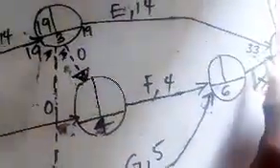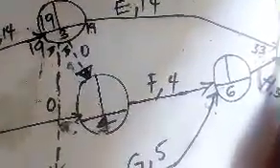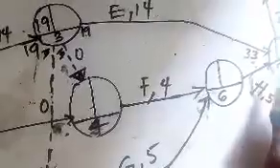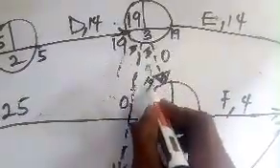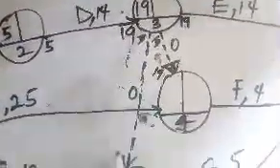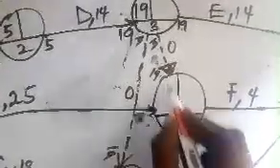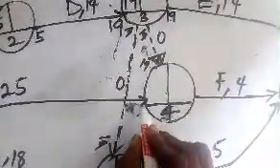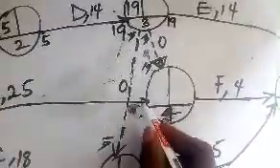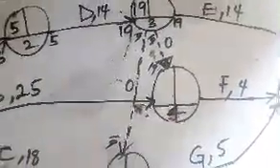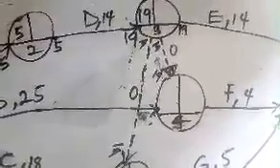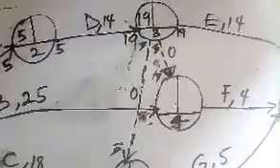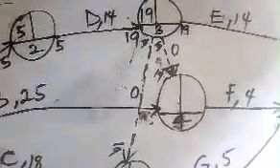So I have this as 33 beneath here. 33 can't enter here yet. Why? Because I have another activity coming here. So I need to consider the greatest value. So I come back here. 19 plus 0, 19, beneath this arrow. 19 plus 0, 19, to this arrow. So 19 can enter here because I have another activity coming in here. This is applicable to any daily life activities. Wherever we are being taught engineering maths, please, they are all applicable. I'm telling you, they are all applicable.